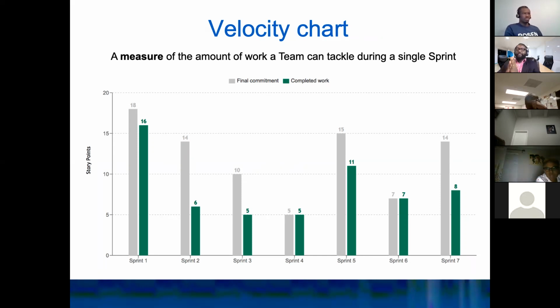Most of the time, people are taking the average of the past 3 sprints to calculate the team's velocity. Some people are taking the last sprint number of points to decide the velocity of the team for the next sprint, or to plan for it.